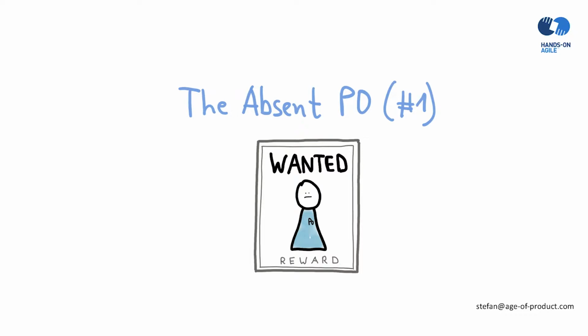meeting the sprint goal. The best product backlog refinement shall not answer all the questions in advance that might come up, because then again, I mentioned it a few seconds ago, you may be running into some kind of upfront planning and large requirement documents in the hope that those will explain whatever might be coming up. It's never going to work this way. That would be way too granular to actually make it compatible with Scrum.